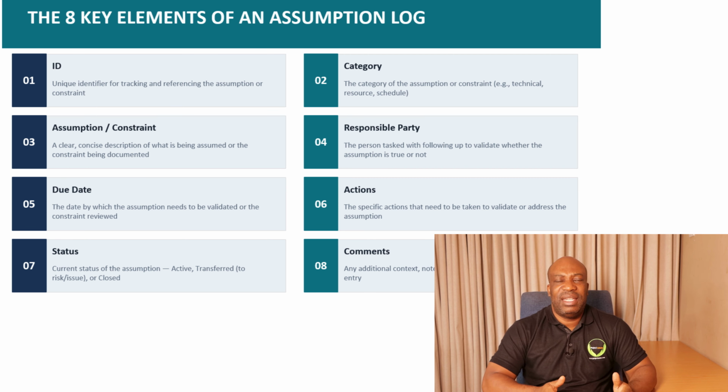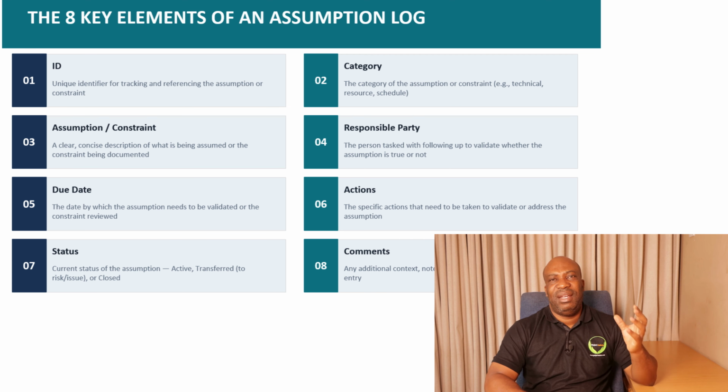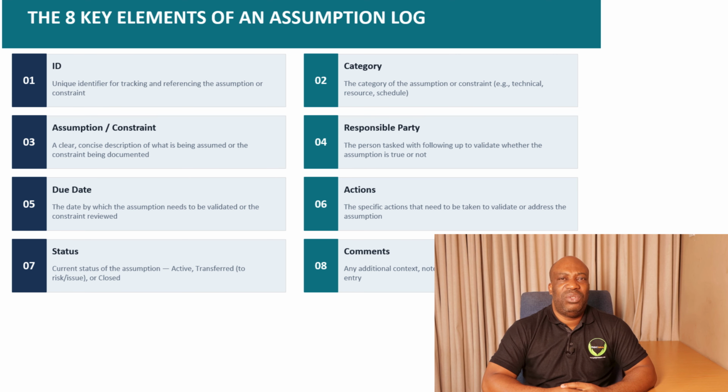If there's anything that has to be done in a project, you should always make sure that it has got a delivery or due date. The reason why you should have a due date is for you to be able to see whether you're on track or not on track. Do you want to crash the resources? Do you want to fast track the resources? And so on and so forth.